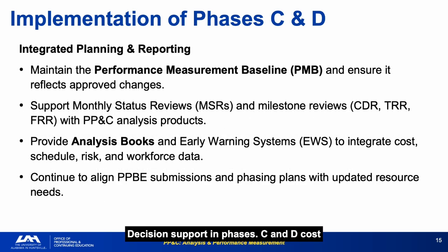Decision support in phases C and D. Cost and schedule/risk inputs for trade studies, integrated analysis for major reviews, replan, and recovery support. The 3-question framework, what happened, so what, now what, is the delivery standard for all decision support products.